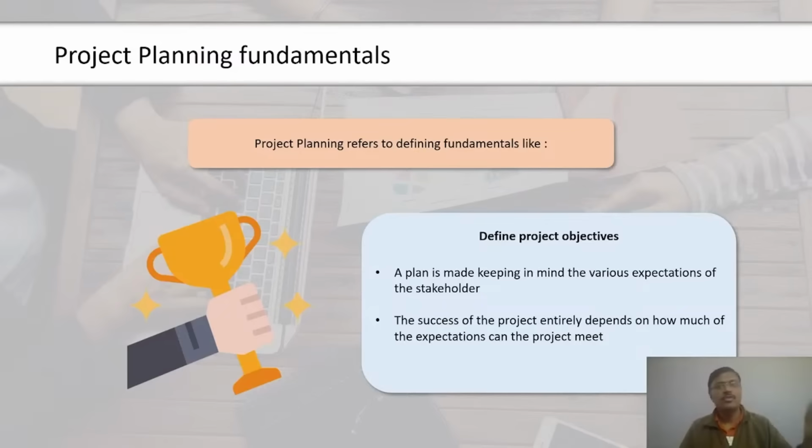The next parameter is estimate to complete, or ETC, which is cost of the project from this point to the end. This is calculated by subtracting the actual cost from the estimate at completion. In addition, variance at completion can be calculated by subtracting the estimate at completion from the budget at completion. Variance at completion is the cost estimation whether it is over or under budget.